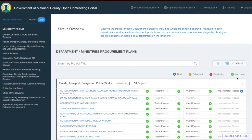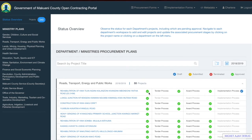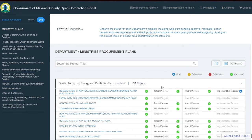Only approved projects are available on the public portal and will show in the dashboards. For example, looking at Roads, Transport, Energy and Public Works, the first project — rehabilitation of Quatuva — has a green icon meaning the project has been approved. The tender process green means the tender process has been approved, the award process green means those forms have all been approved, and the implementation process in blue means some or all implementation forms are currently in draft.